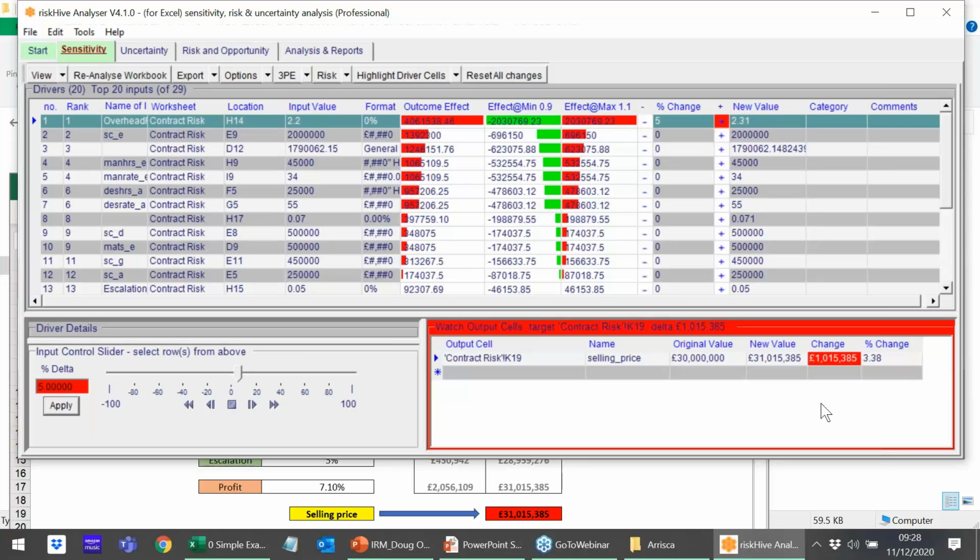Of course, if we're particularly sensitive to a particular input, then it really makes sense to do some scenario testing to see if we can withstand it increasing or decreasing. If a 5% increase in a cost is going to tip a project into unprofitability or blows through the budget, then maybe we might want to put sufficient controls in place to mitigate that risk. Maybe it's about taking out a long-term pricing contract with a particular supplier, or hedging our exchange rates, or whatever. For me, risk management isn't just about dealing with problems when they occur. It's about proactively incorporating that risk-based decision making throughout the process.